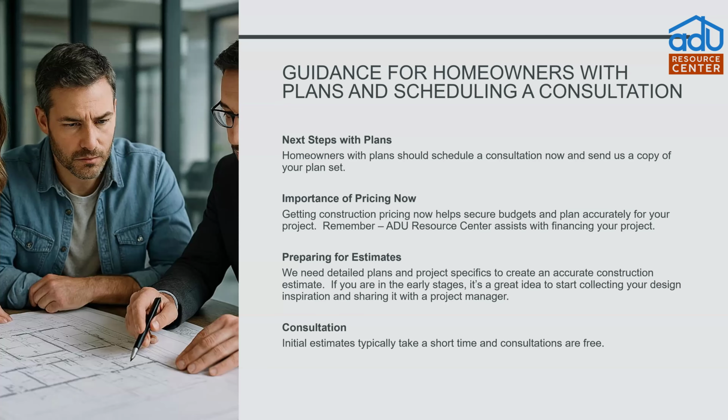As you get closer to RTI, when your plans are ready to be approved, the city's already gone through and worked out the details. They've gone back and forth with the architect. They've made the changes that are necessary, and there's not going to be a whole lot of surprises when they're about a month out from being reviewed. And that's when we're going to have the contractors put together the formal estimates where you'll see the details of each contract broken down.